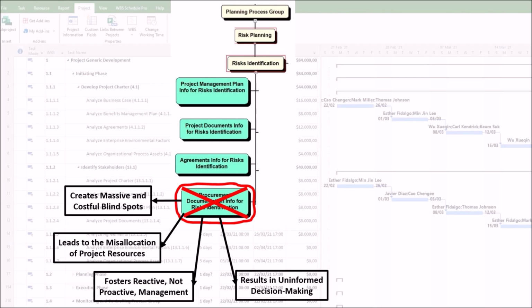For example, the team decides to switch to a cheaper component, not realizing the procurement contract mandates specific brands for warranty and compatibility reasons. This decision voids the warranty and creates integration issues, creating new, more severe risks.